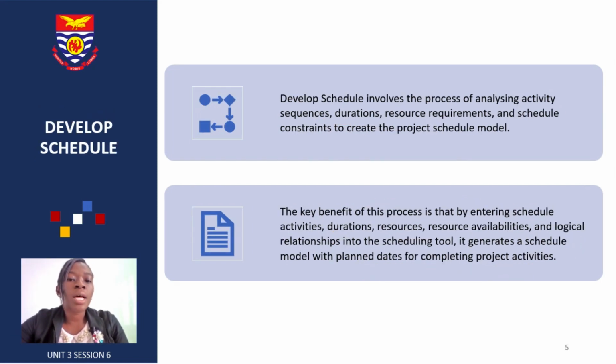Develop schedule involves the process of analyzing activities sequentially: what should come first, what should follow. Now the duration for each activity, the various resource requirements needed, and the constraints to that activity all have to be looked at in order to create the schedule model when you are developing your schedule.